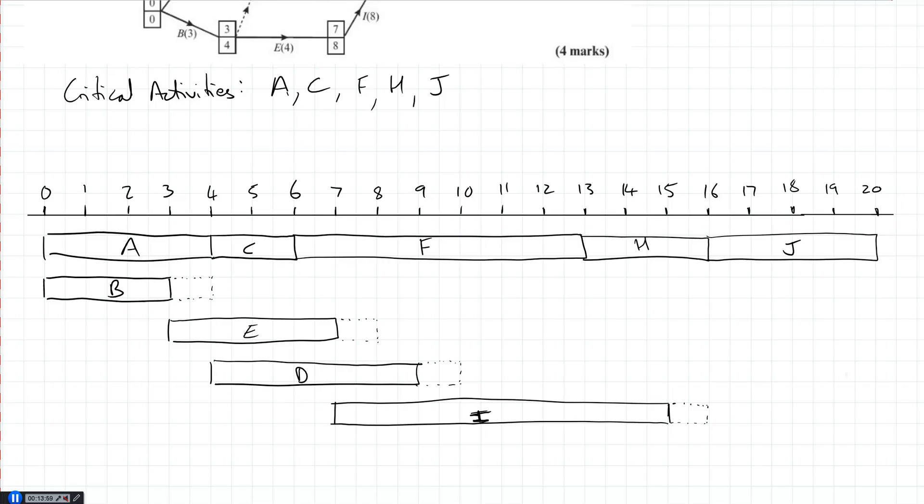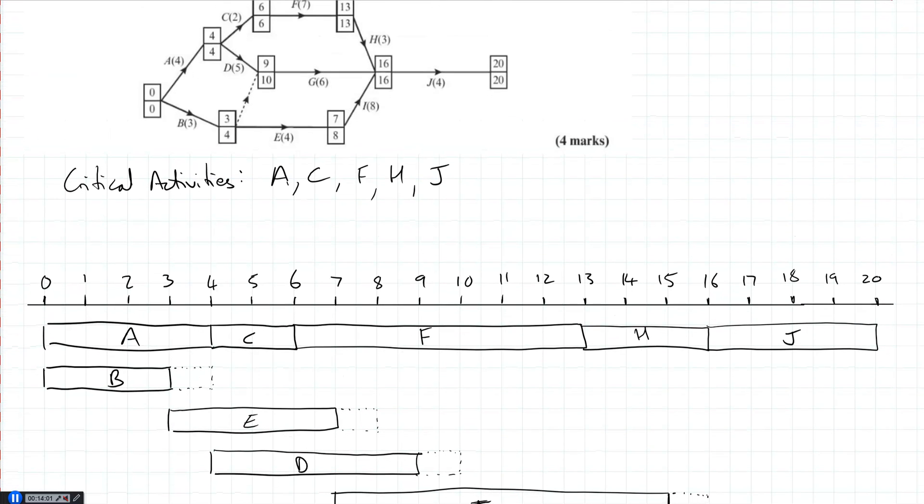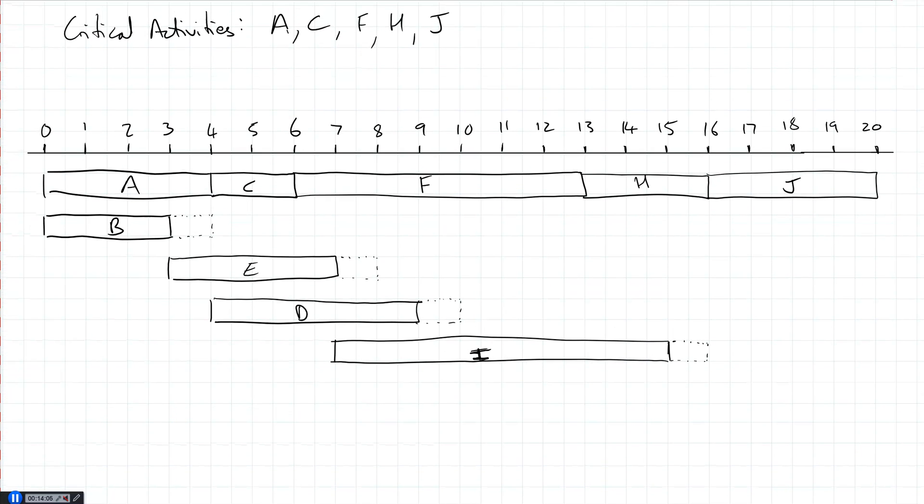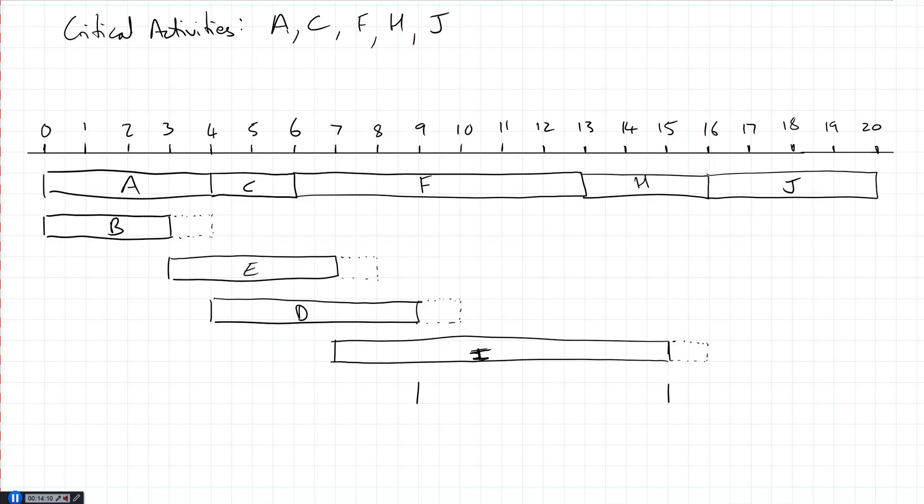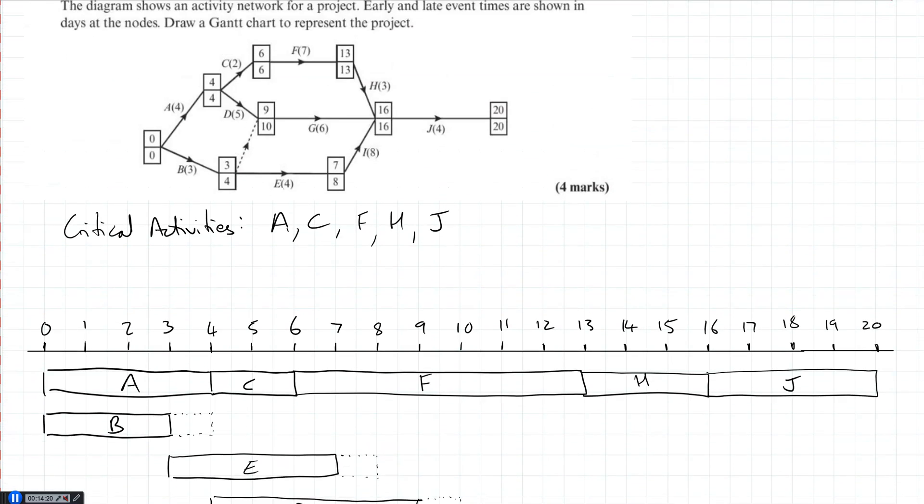So G can start at 9. Take 6. So it goes up to 15 as well. Float of 1 as well because it goes up to 16.